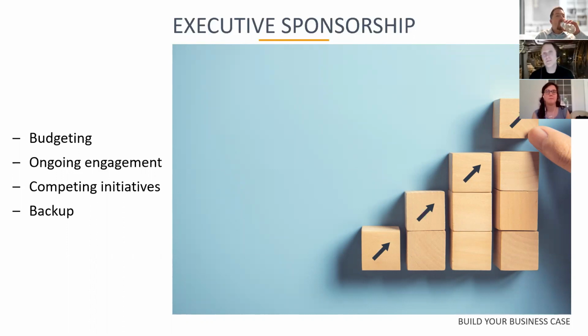Having an active and visible executive sponsor is absolutely a critical key component to project success, including ongoing adoption. We have found multiple times that different parts of an organization absolutely will move forward with your initiatives and successfully implement and adopt it if the leader has done so. Now, your executive sponsor should also be creating alliances with their peers, promoting a project at regular intervals at other executive meetings.